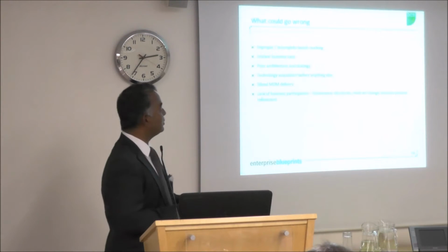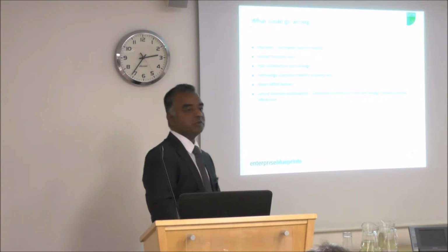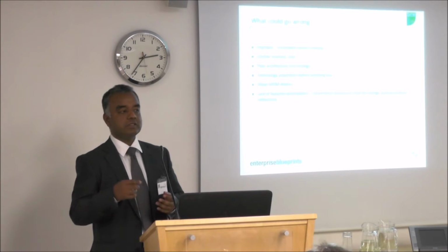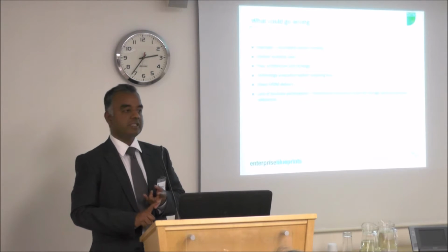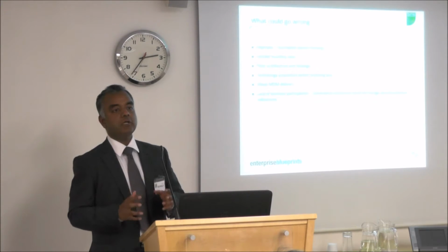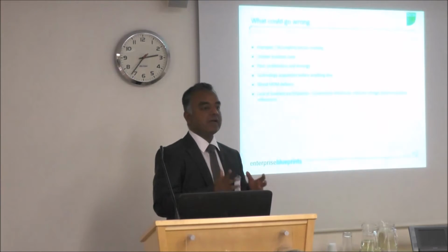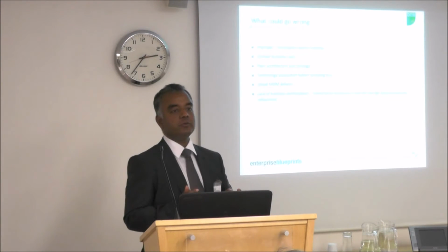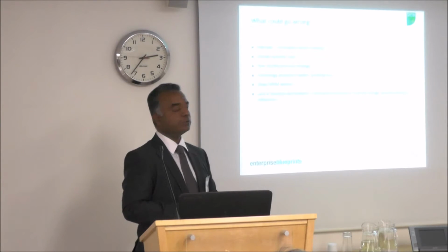So it is very important to write what the business case is, because as you are delivering the MDM project, inevitably you will have to go through some change. Something is going to get delayed, some particular vendor is not going to deliver something or the other. At that point in time, if you want to change the scope or course correct, you will have to go back to your business case to look at which aspect of it is going to be significantly impacted because of the change that we need to now deliver.